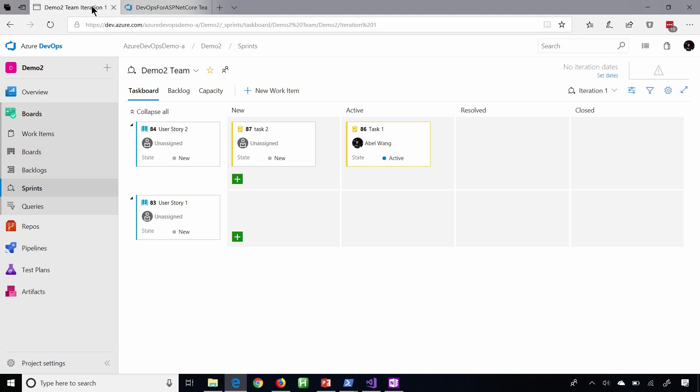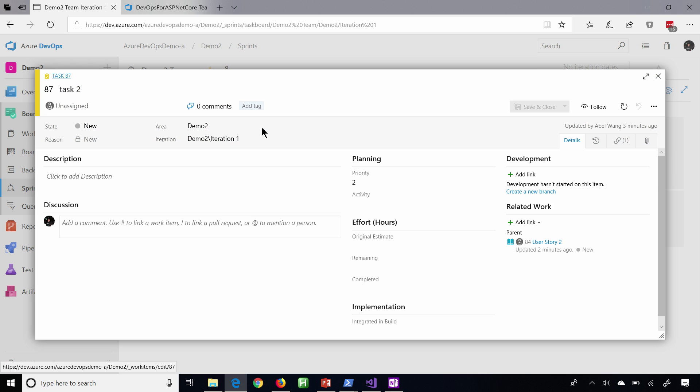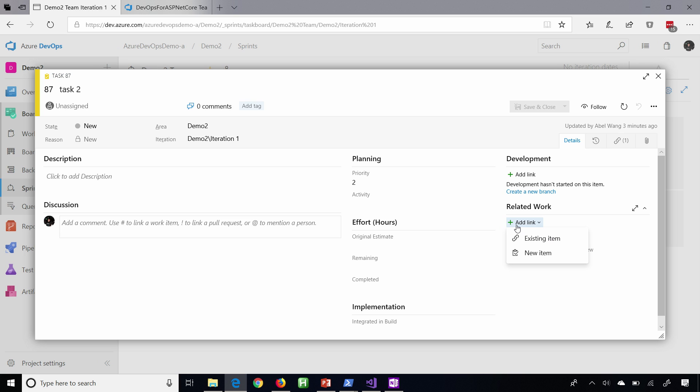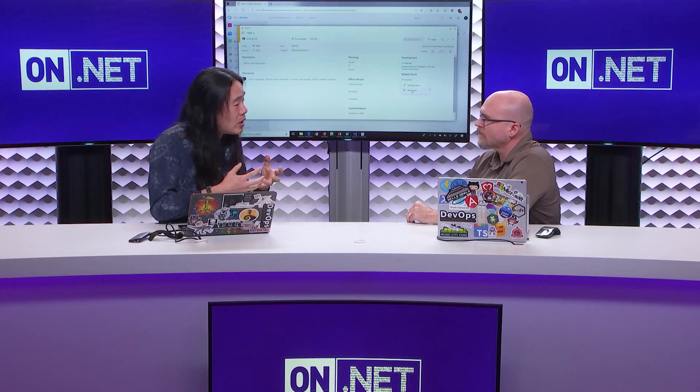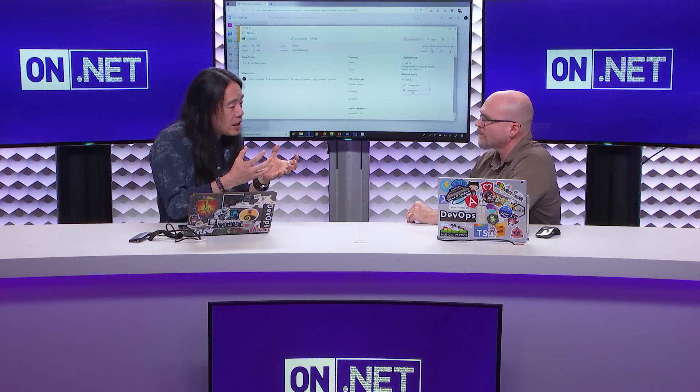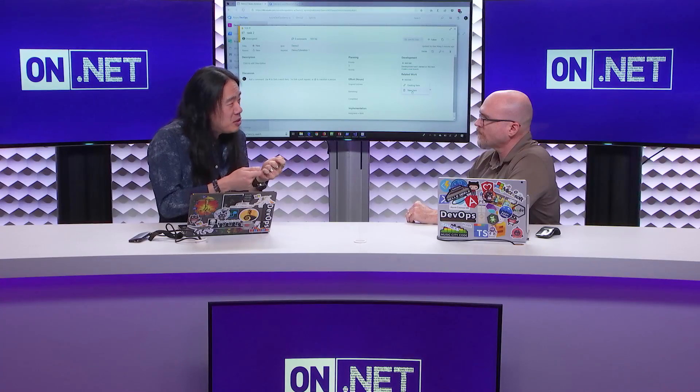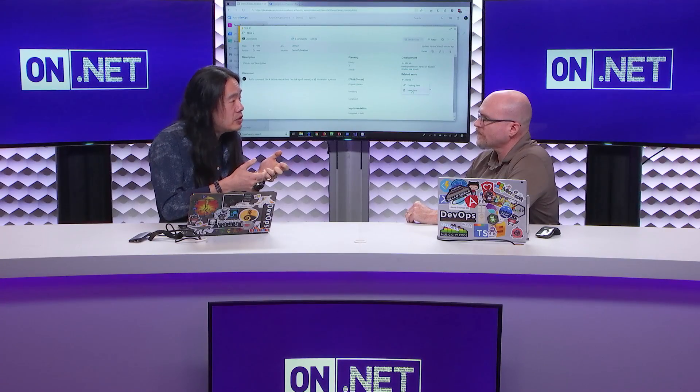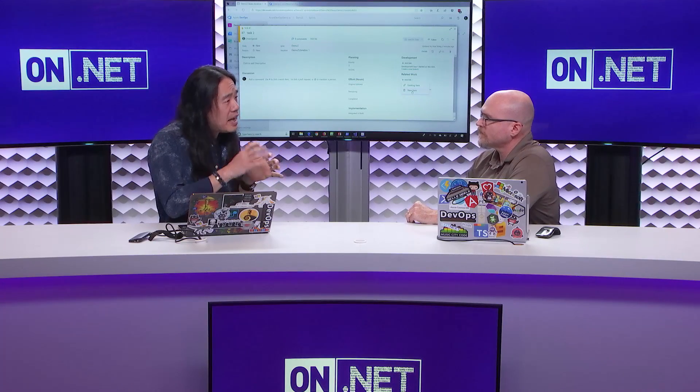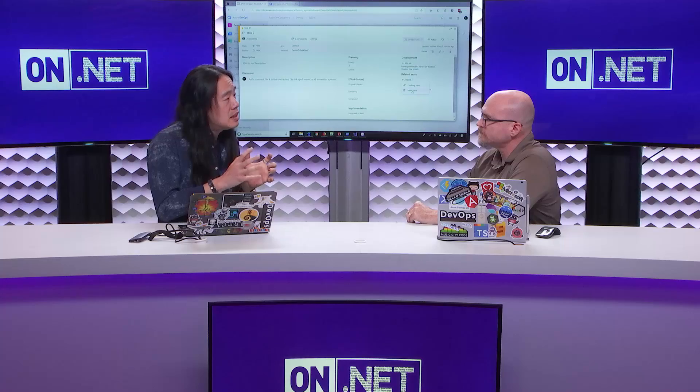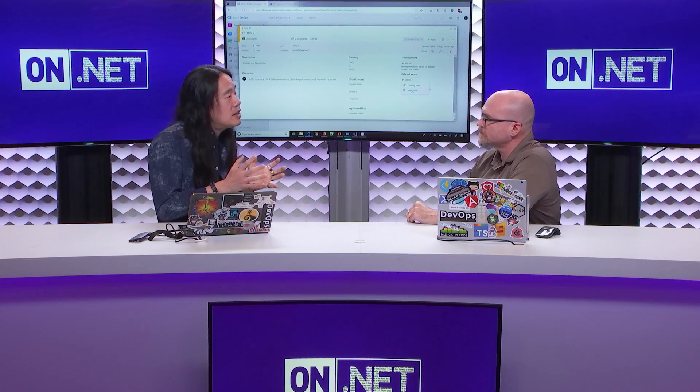So the other thing that I wanted to show you is, for each of these individual work items, you have the ability to link them as well. So there's like a parent-child type of link, so you've got a user story that's broken down into tasks. And so your related work, you can use the UI and it'll link everything for you automatically, or if you want to link things in a manual type fashion, you can do this as well. And create a new item on the fly. Yep. So once again, this really helps with the project planning. Like as a developer, a lot of times when I first start my sprints, we break things down into user stories. And then when we have our first sprint planning meeting, I try to start estimating or breaking apart the user stories into tasks, that I think I'll need to do to finish that particular user story. And then that gives me a pretty good idea of how long it's going to take for me to finish that user story.